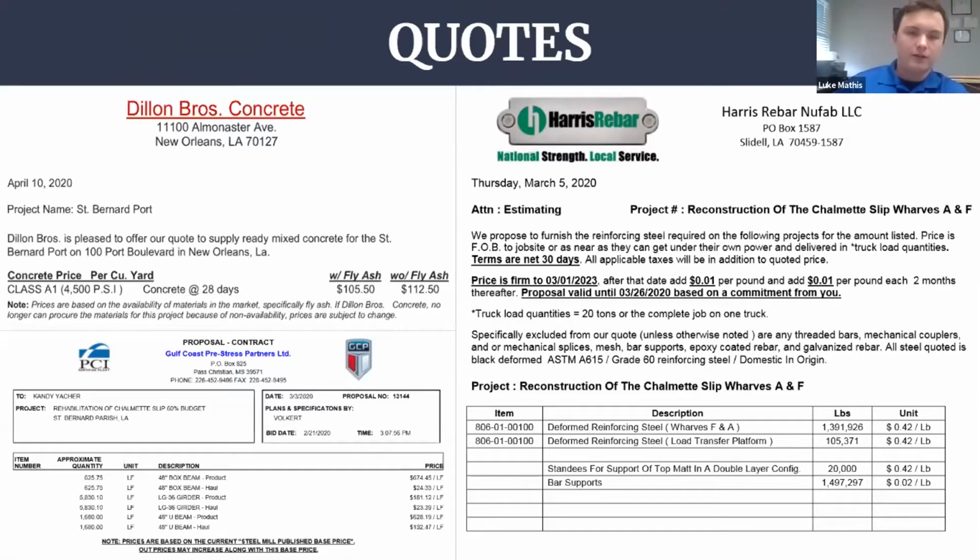To help verify that rather large number that I was just mentioning, we attached a couple of our quotes into our PowerPoint. Almost all of our quotes were provided by Mr. Jeter, except early on, before we got any quotes, we immediately started working on this estimate. And we thought the first thing to look for would be the concrete, because it's pretty easy to call a concrete plant and ask how much it is per yard for what the plan specifies for the concrete to be.